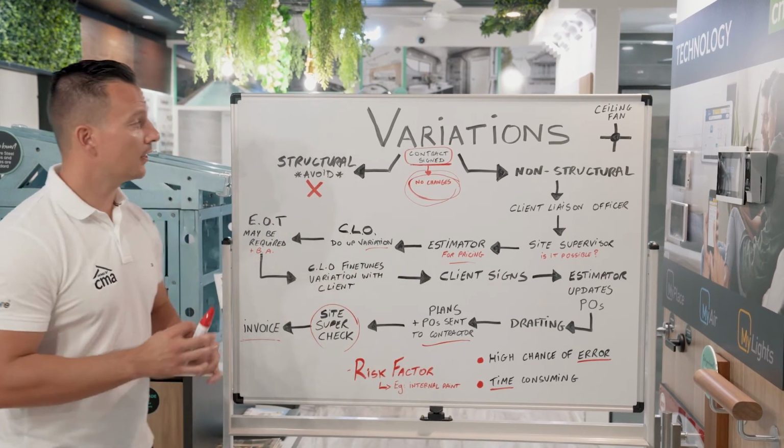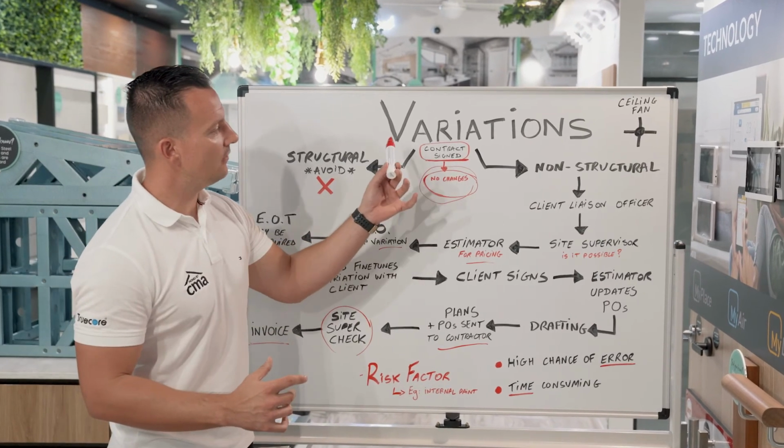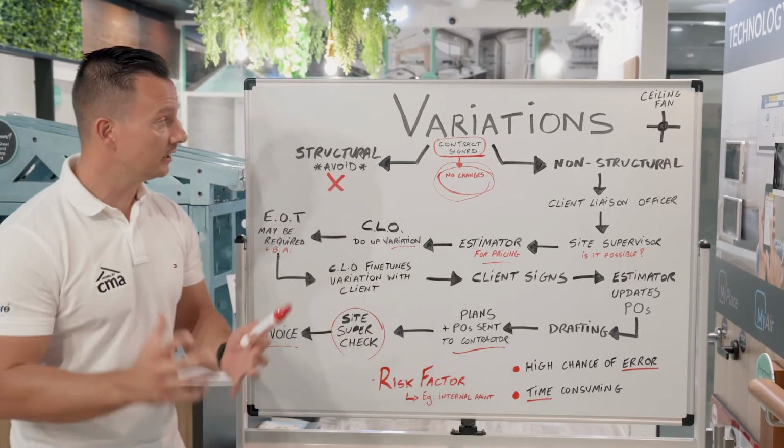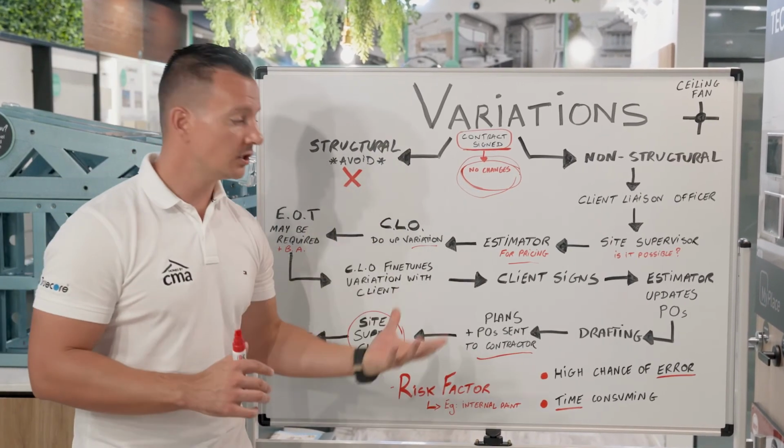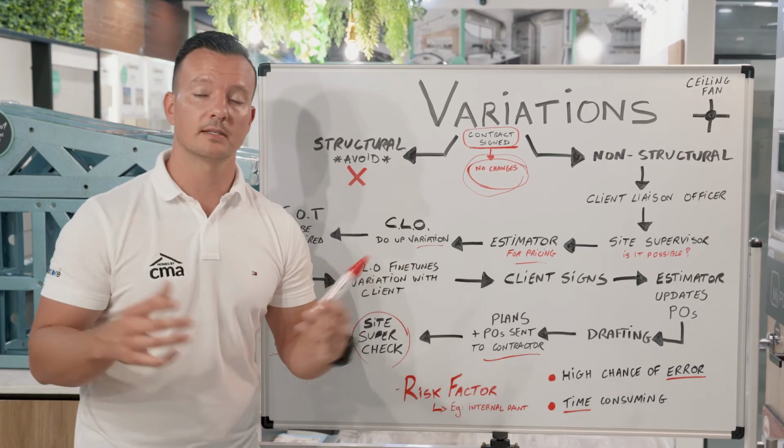So to conclude, the best thing you can do is always get everything done before your contract is signed, so that there is no variation, because if there is one, it will incur a variation fee and there's a high chance of mistakes.